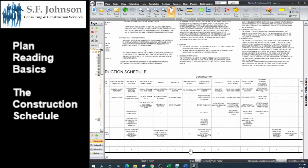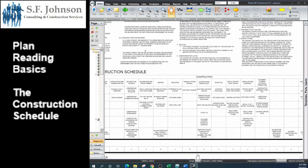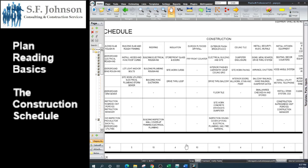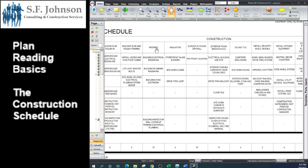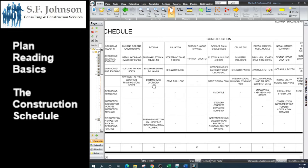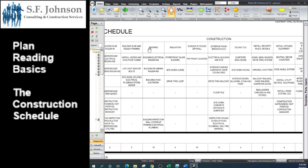The bottom number is telling us how many days it's going to take them to achieve whatever is in the column. If you do any project management courses, you know that you need your detailed estimates in order to determine to accuracy how long any of these scopes of work is going to take. A good cost book will help you determine the man hours for each of these operations.